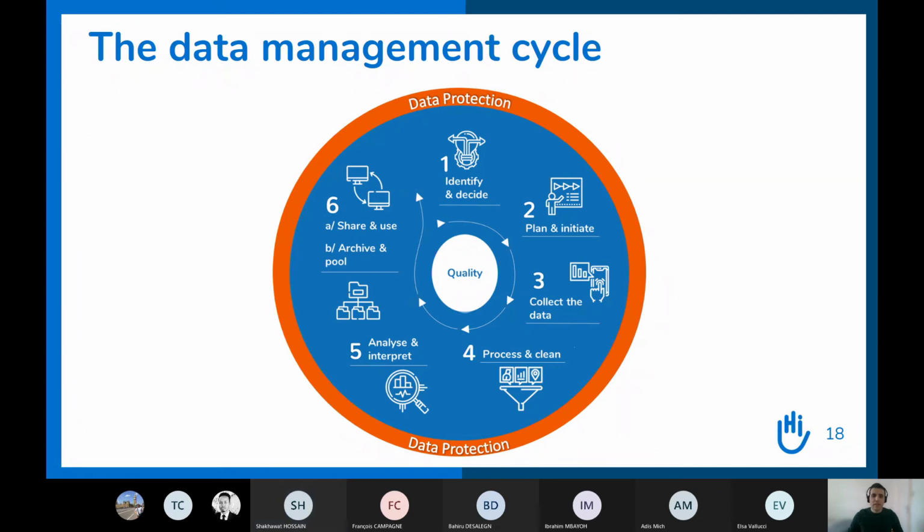So actually it depends on the donors and on what you have put in the project proposal. But for instance, if for your source of verification for the indicators, you put that it's a digital database, and it's even better if you can put anonymized digital database, then you're good. It means that your donor, because this is something that is in the logical frame usually with the indicators and source of verification, and it means it's in the contract.